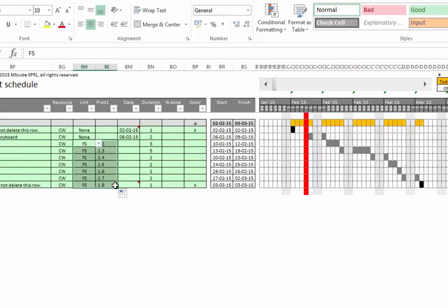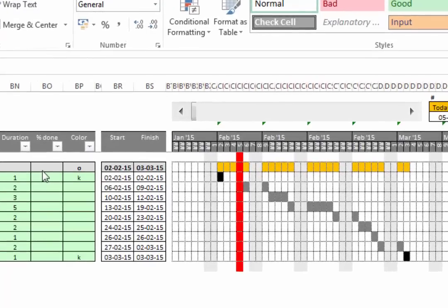Once you have entered the number of days and the start dates or links, the end dates are calculated automatically, and Magic Gantt tells you exactly when the tasks in your project will be done. Once your project has started, you can track the progress on the tasks by updating the Percent Complete column in the task rows. In the Gantt view, the Gantt bars will show light blue for the complete portion of your tasks. By contrast, the incomplete portion will be highlighted in light grey.